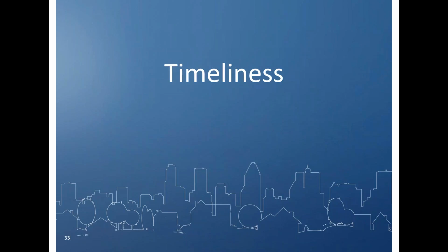Then what you're going to have to do is, as the costs actually are incurred, document those actual costs and true up your budget, right? Because it might be that if you hire somebody a little bit more expensive, one category goes up, or maybe you spend a little more on travel than you thought. And so you're going to have to track that over time to see how it ends up working out.